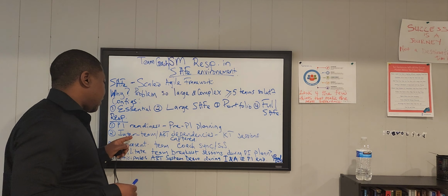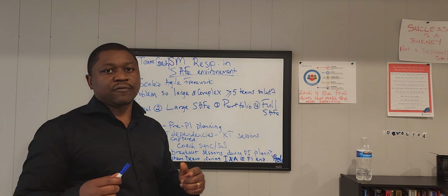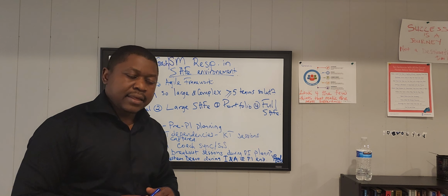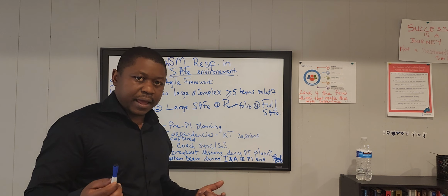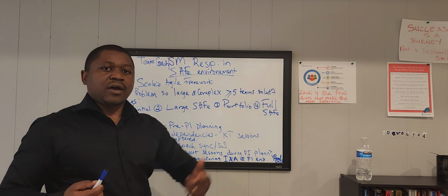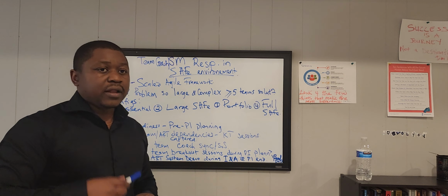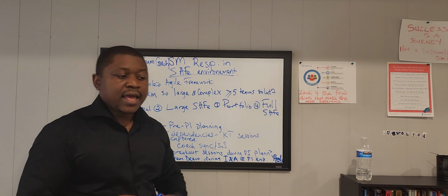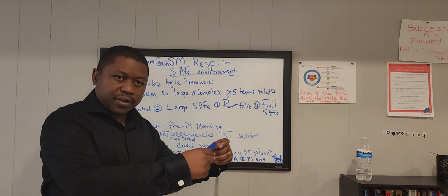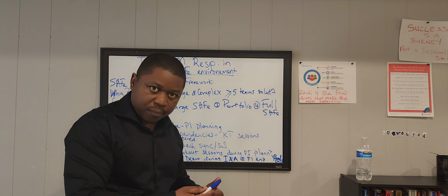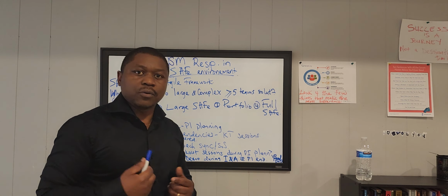Then I also make sure all inter-team dependencies are captured ahead of time before PI planning. It's so important because you don't want to be attending PI planning and for the very first time you are letting other teams in the ART, and ART just stands for Agile Release Train, know that, hey, I'm going to be relying upon your team to finish up this particular user story before we can pick it up and go on with our own work.